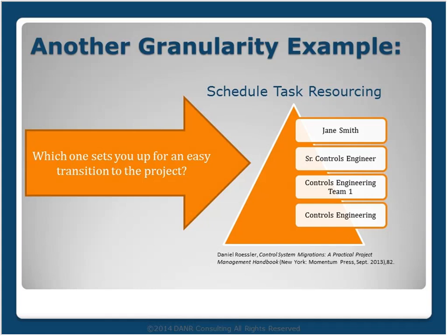Good schedules balance calendar timing and project staffing, and another essential component of good schedules is having well-defined predecessor and successor relationships. So we're not going to talk a lot about some of those items, but as you set your task resourcing within your schedule, you want to give some thought to how you as an organization would work the project moving forward into the execution phase. So, for example, you can have a general discipline term such as controls engineering, or a very specific named resource such as Jane Smith.